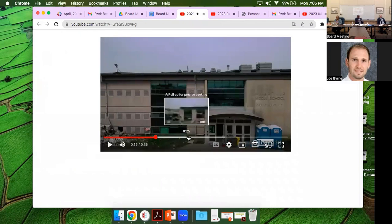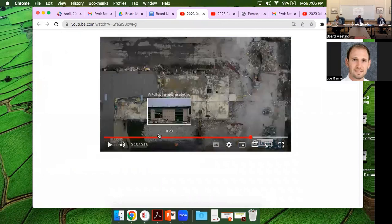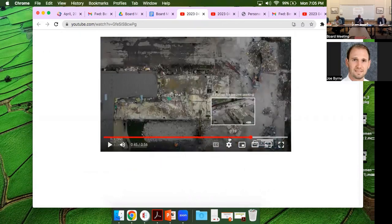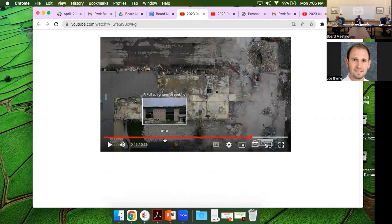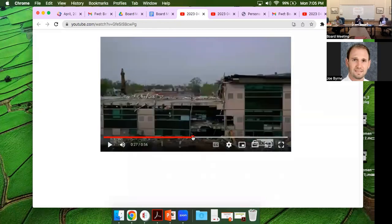And then just to kind of fill you in on stuff remaining for the new building, we continue to pick away on punch list items, commissioning, open commissioning items. There are 2 punch list items left for the building and about 10 commissioning items, commissioning being related to the HVAC, the mechanical systems, just making sure everything is dialed in per the design and that there are no issues moving forward. So we continue to work on that stuff in the off hours, on days off, and we're just about there. So that's really the update for Sunnyside MacArthur.